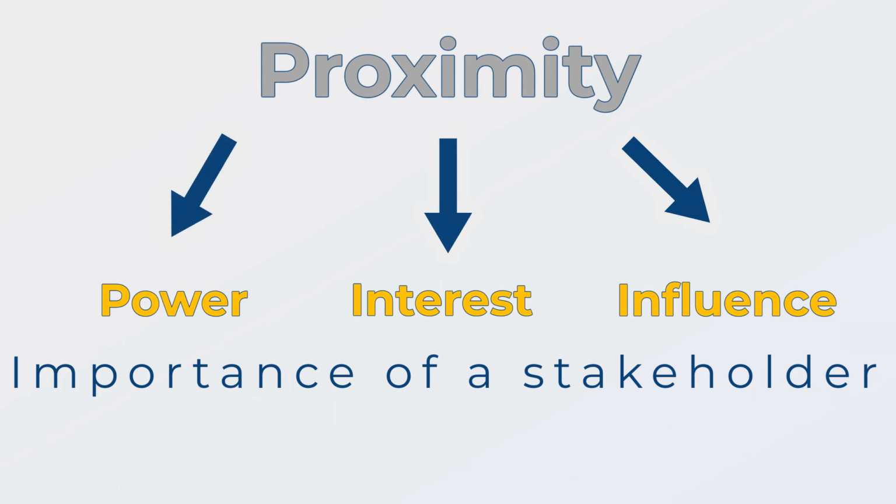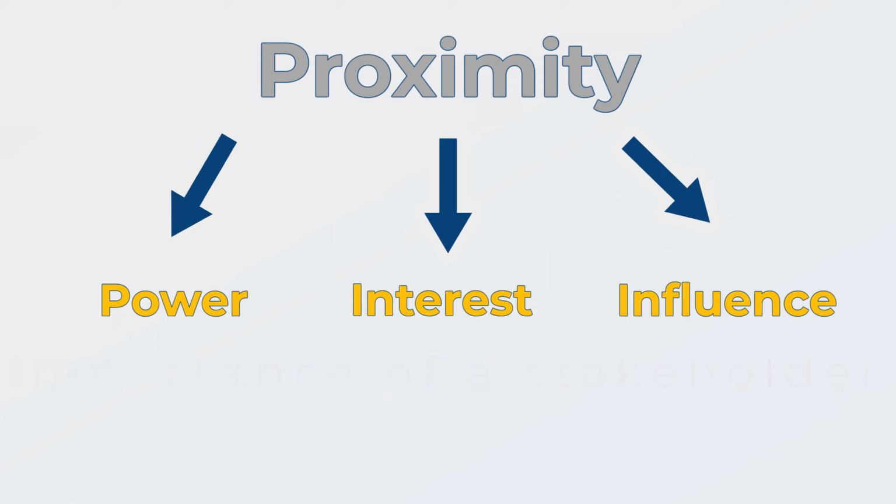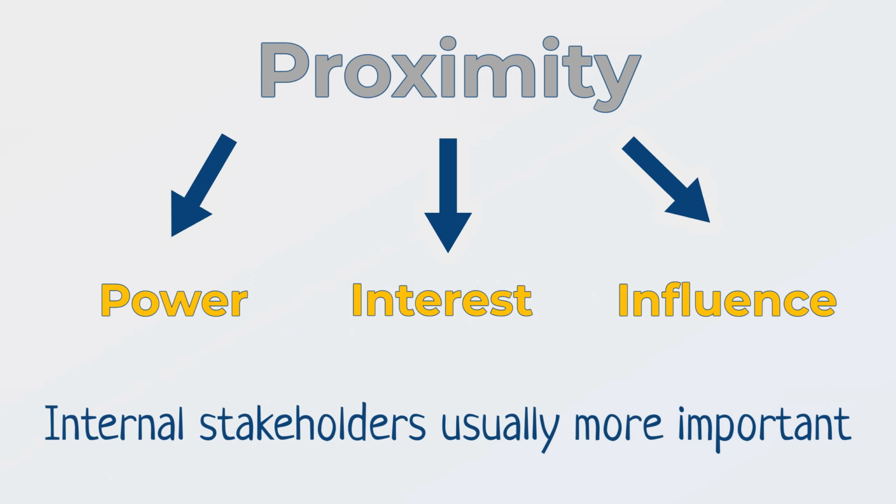Therefore, proximity, or how close the stakeholder is to the project environment, should also be taken into consideration when analyzing the stakeholders. Stakeholders that work in the organizations involved in the project are closer to the project, hence more powerful, more interested, and more influential than external ones.